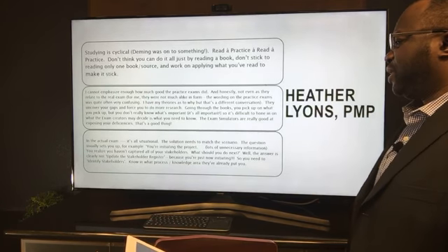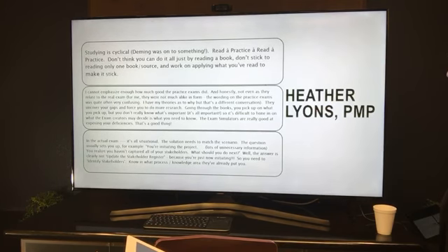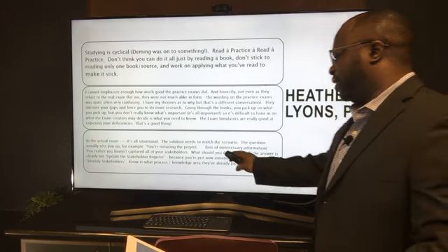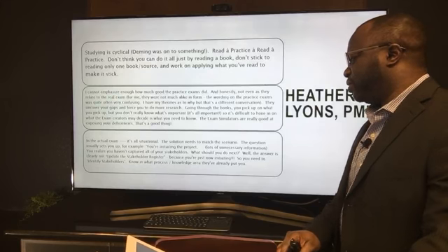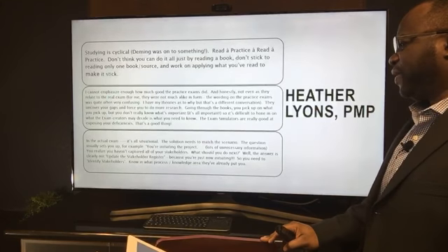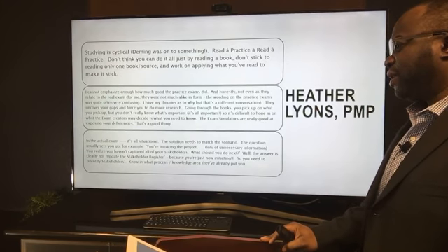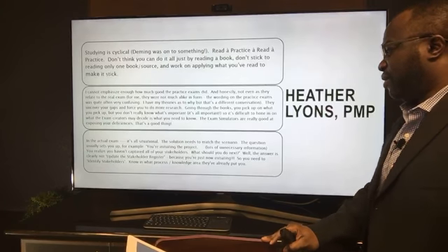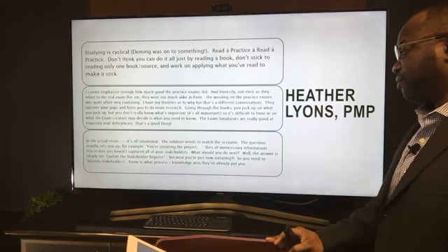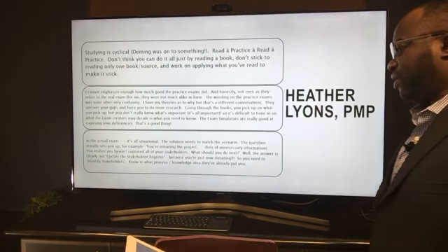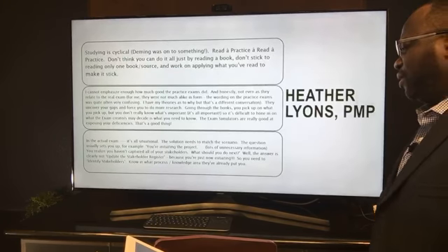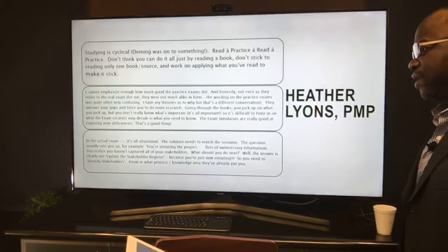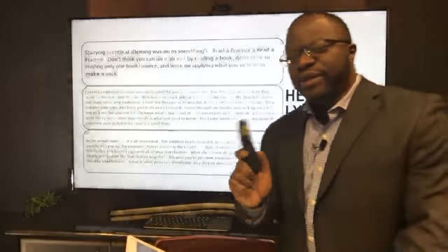The question usually sets you up. For example, you're initiating the project, lots of unnecessary information. You realize you haven't captured all of your stakeholders. What should you do next? Well, the answer is clearly not update the stakeholder register, because you're just now initiating. So you need to identify stakeholders. Know in what process or knowledge area they've already put you. So note the subtlety there.